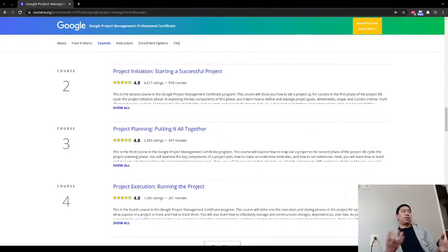We may need to purchase X amount of servers, which then in turn means we need X amount of budget, or maybe we need some services that might be difficult to come by, or it could simply mean that in order to fit the timeline, we probably need X amount of engineers to work together on this task so that we can deliver it on time. Also keep in mind, during the initiation phase, it's usually just a rough estimate.